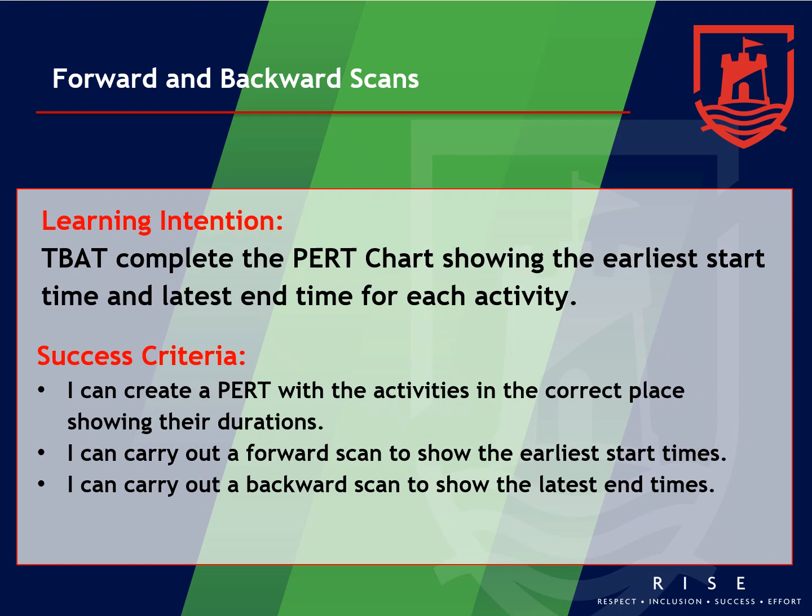Success criteria is create the PERT chart, that's really from last lesson, showing the durations. Carry out a forward scan, showing the earliest start times, and carry out a backward scan to get the earliest end times.